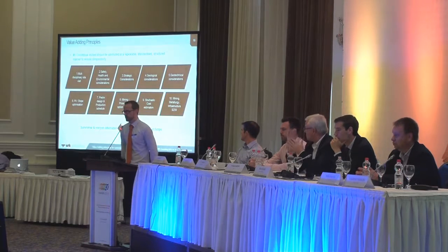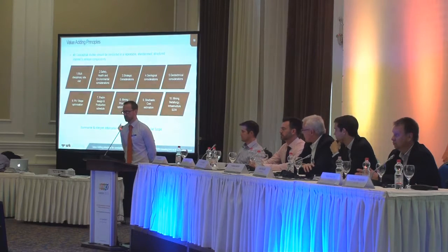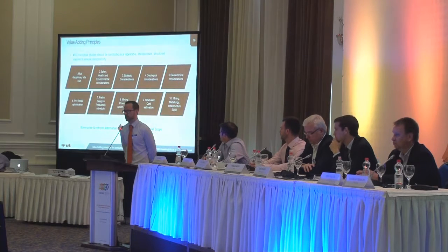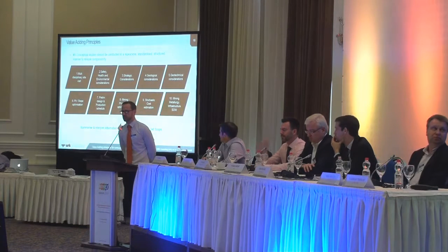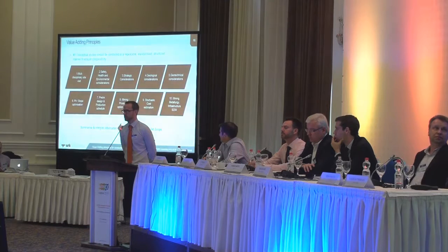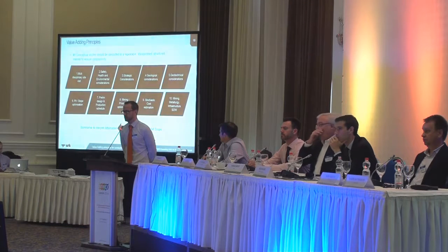So just one example, the first point there in a suggested structured approach, a multidisciplinary site visit: you want to send the right experts to your site. If you've got a mineral sands deposit in Senegal that's right next to a village, you probably want to send your environmental and social experts as soon as possible, because if you're going to face a potential village relocation, it's important to get involved with the right people on site as early as possible. So you want to make sure that you cover yourself for all of the risks in your conceptual study from the start.